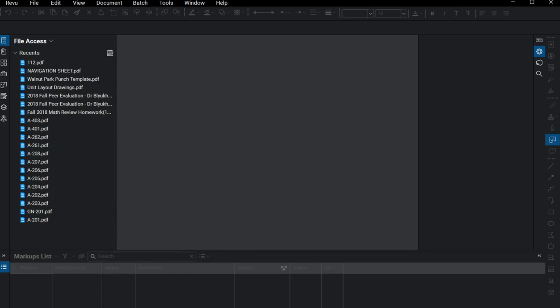Now, more traditionally, punch lists were created, and not necessarily just punch lists, even completion lists or some types of documents during the construction process to track scopes of work and their completion, things that might be missing, things that might need to be repaired or redone. And more traditionally, that might have just been taking a notepad out to the field and walking around the building, noting where things that don't meet the spec are located, what the issue is, who's the offending party, so to speak, or who needs to